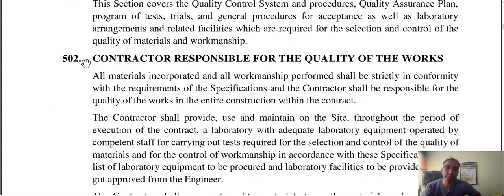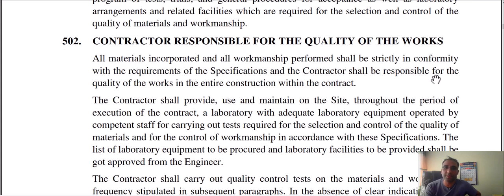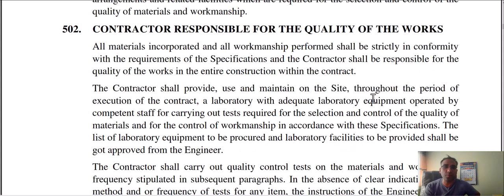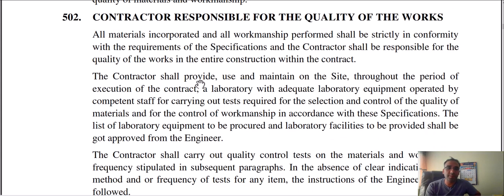Specification section 500 covers the contractor's responsibility for the quality of the work. The contractor shall provide, use, and maintain on site, throughout the period of execution of the contract, a laboratory with adequate equipment operated by competent staff for carrying out tests required for the selection and control of quality of materials and for control of workmanship in accordance with the specification. The list of laboratory equipment shall be procured and the laboratory facility shall be approved by the engineer.